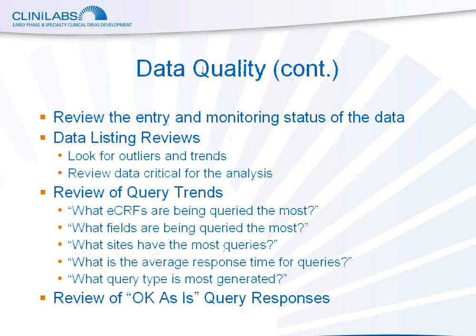So a few items, some of which may be done already in paper studies, but which move to the forefront in EDC studies, should be implemented to counter this detachment. The first is the review of the entry and monitoring status of the data. Data managers should work with the project managers to always be aware of the enrollment status and visit schedule of the subjects. These items should then be used to review the entry and monitoring status of the data to ensure that they are done within the agreed upon and/or reasonable time frame.